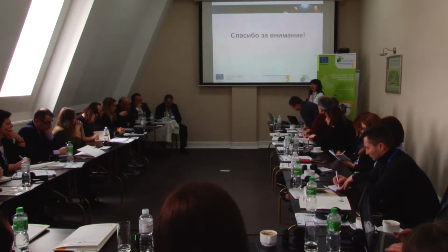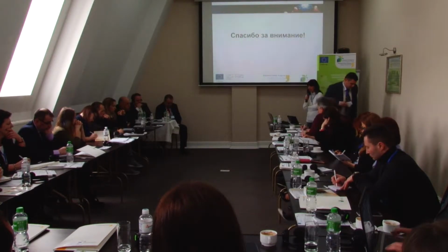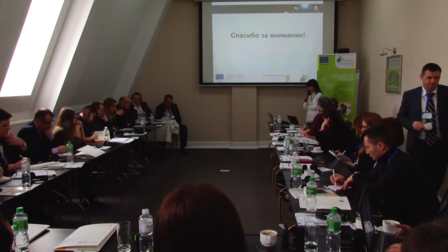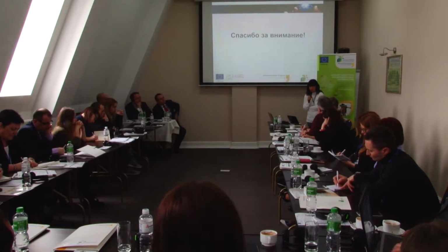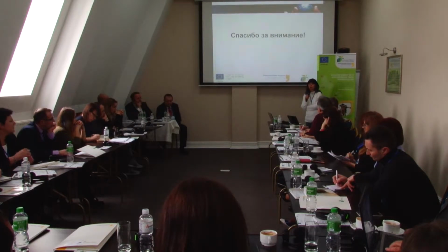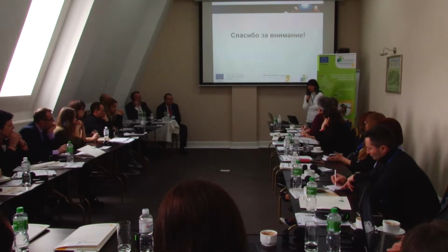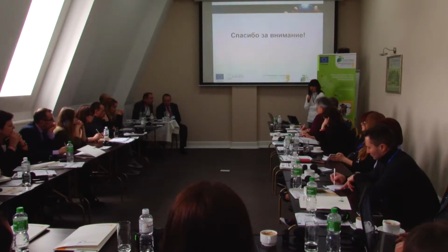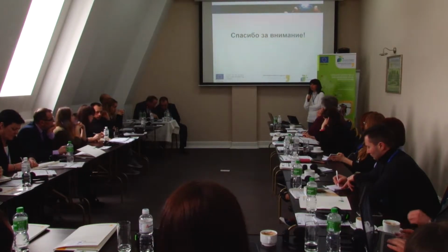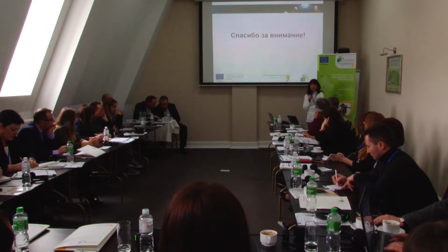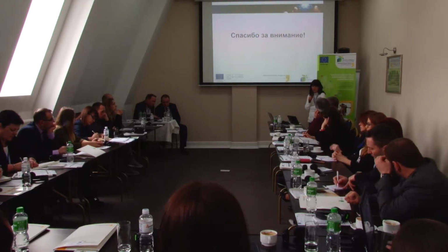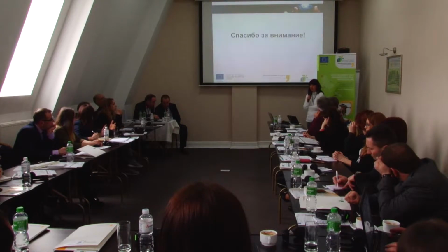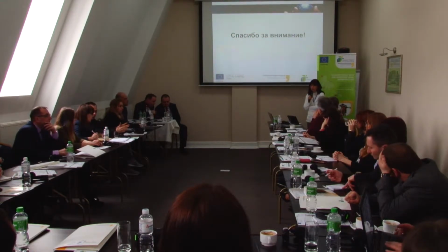Also, the design work cost includes technical design document development, and I recommended that the contract with the designer also includes examination. What do I mean? You, as the customer, order it, but all the organizational parts will be done by the designer, as a separate attachment to the contract. You will just pay for the examination. I mean, you won't have to be overburdened with details. It will be done by the designer. You will just pay the cost because the designer already has some contacts and has some experience of working with such examination entities. It's much easier.